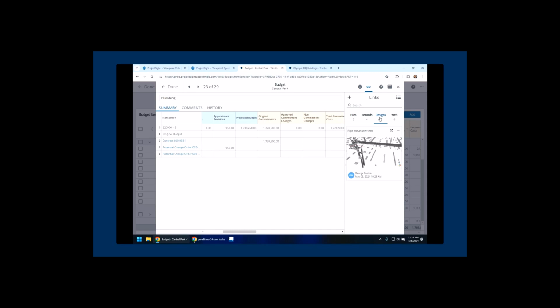So, Alex, I know you came out of the industry. I know you're planning on going through some pretty cool stuff next week that is specific to MEP contractors. But have you seen any examples of where models are linked to a budget like this? Yeah, absolutely, Hunter. And this is something we'll dig a little bit more into next week as well. But within Connect, you can see we've got our model view linked here, and we can actually set up a budget code as a property and associate the budget code and the content in the model to a status. And so that can really help give us a clear picture and a direct link between the two, to help explain where we're at with the project.